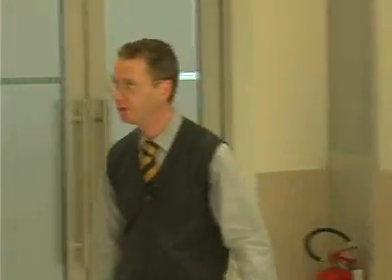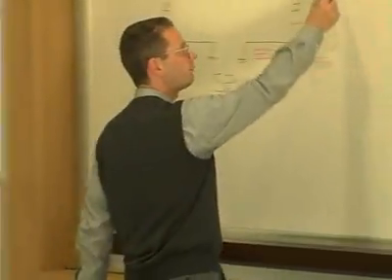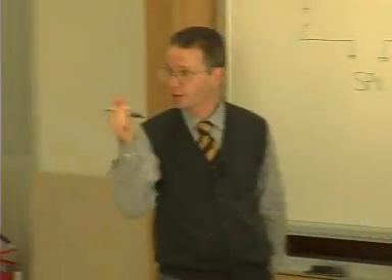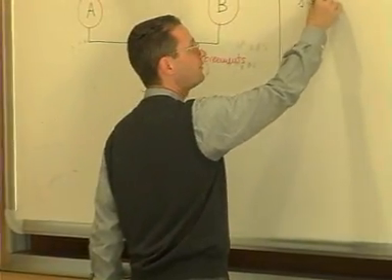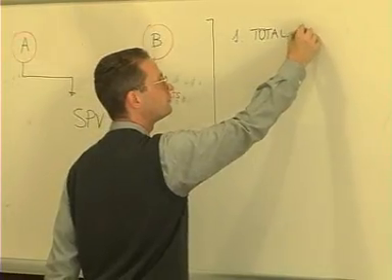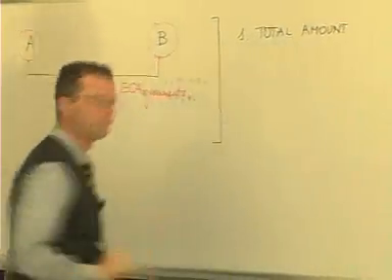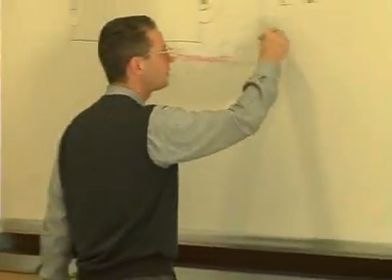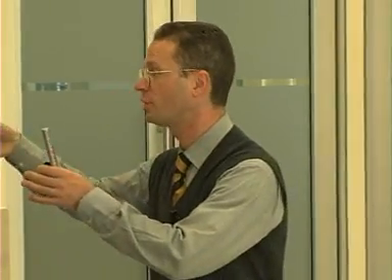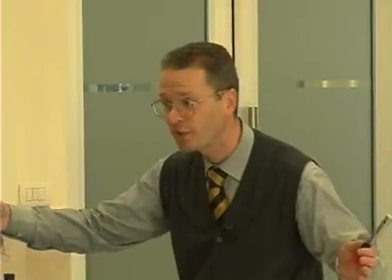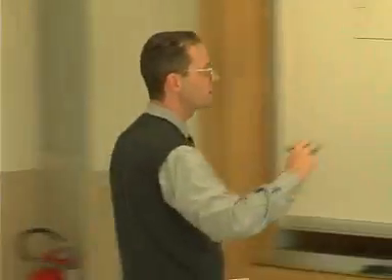What is included in such an equity contribution agreement? It will certainly include very simple information. The first one is the total amount of equity that must be contributed. The second point, much more relevant in the negotiation between sponsors and lenders, is the timing of contribution, and so the distribution of cash injections by equity holders during the construction phase of the project. So the total amount, and the schedule of contribution.